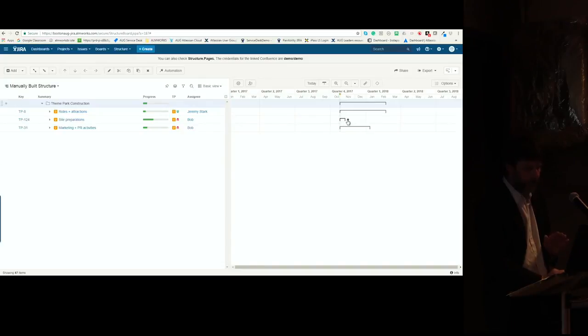And we can see that site prep right now is probably, the rides and attractions are probably dependent on site prep. If that's true, we can easily create a dependency between them, provided I can get this mouse to work. Simply by dragging the dependency, Gantt charts is going to automatically move all of those tasks over in the completion timeline based on the dependency that we just created.